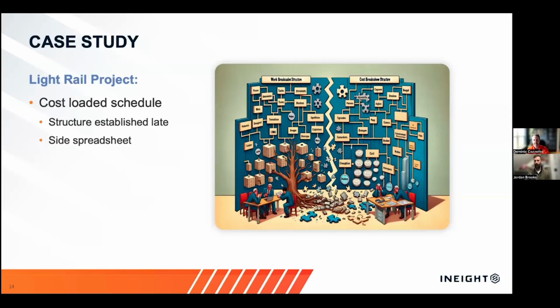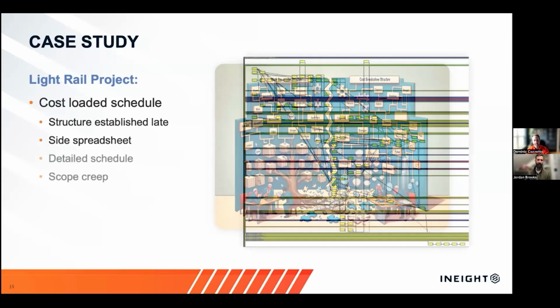What I tie that back to is really the structures being established late. Like I said, there was no estimate schedule. There was an estimate, obviously, that we won the job off of. And then we baselined with a schedule that had nothing to do really with the estimate because they weren't tied together. So what scope was where within that schedule was really up to me to figure out. I'm the scheduler coming into execution time, not being on the bid. It was me just going blind into this and guessing. So there were a lot of growing pains with this schedule early on.